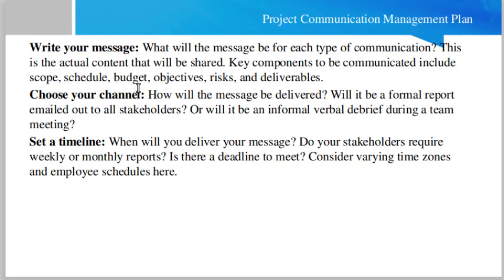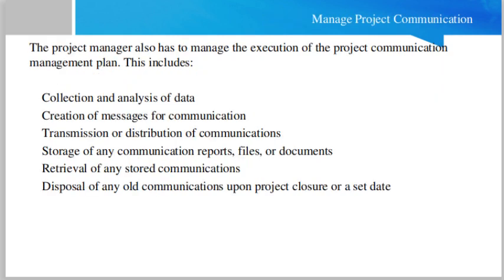Okay, choose your channel, that is, how the message will be delivered. Will it be a formal report, or an email sent out to all stakeholders? Emails will be there, status reports will be there, and verbal communication on phone calls will be there. So what channel will you use for the delivery of communication? Set a timeline. That means when you will deliver your message. Do your stakeholders require weekly, monthly, or daily reports? So what will be the frequency, and what will be the timelines on which you deliver things.